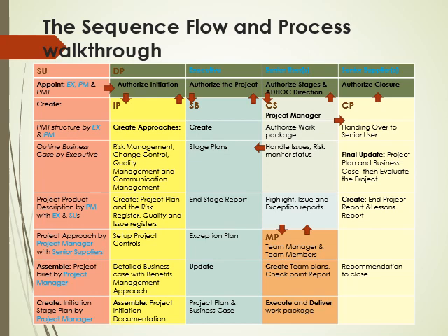So the first thing they do is to go through the project brief and initiation stage plan, and they authorize initiation, okay? So you see the first thing they do is to authorize initiation, where the R&R takes them to initiating the project process. Once initiation is authorized, the project manager goes into initiating a project process, which we consider to be the first stage of the project, which is the initiation stage, the planning stage, to establish all the baselines for the project.